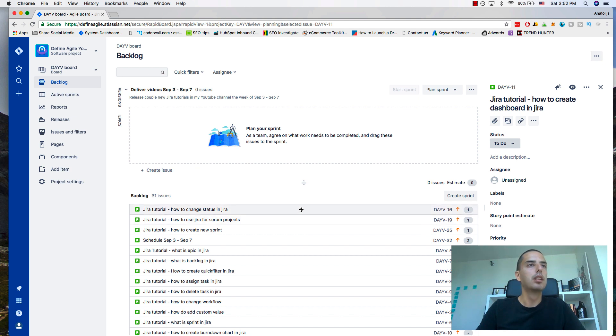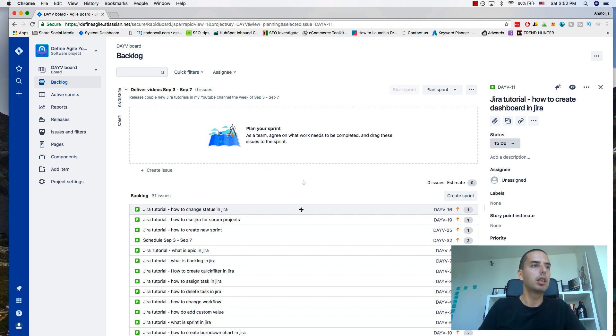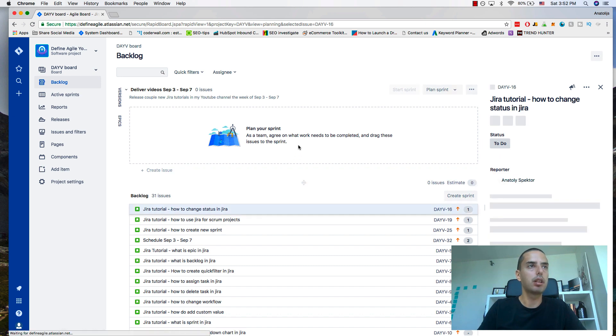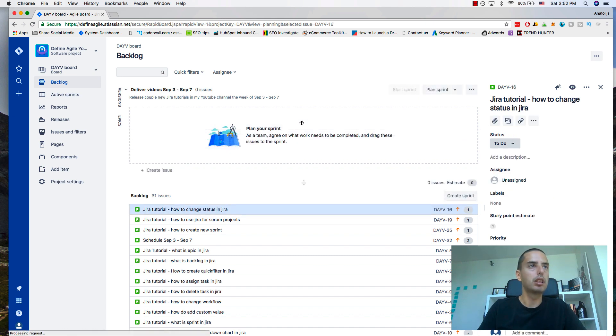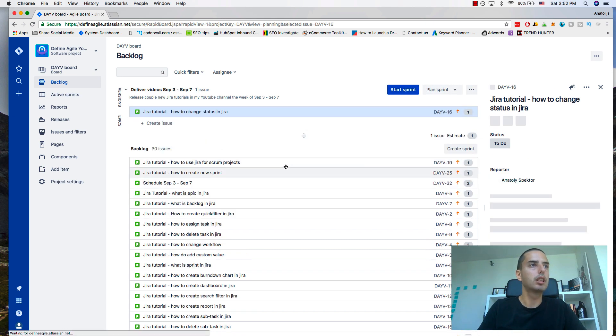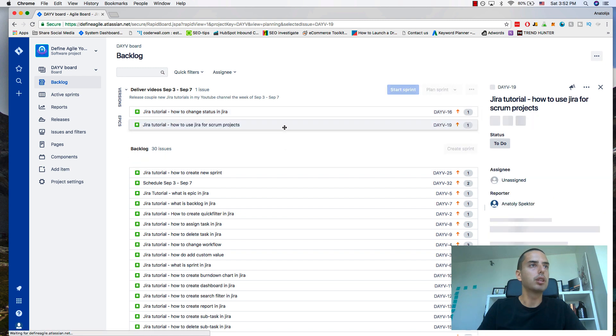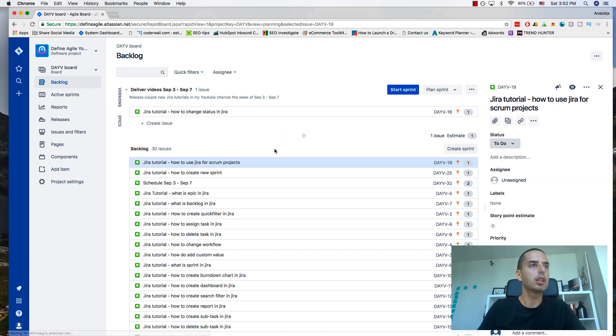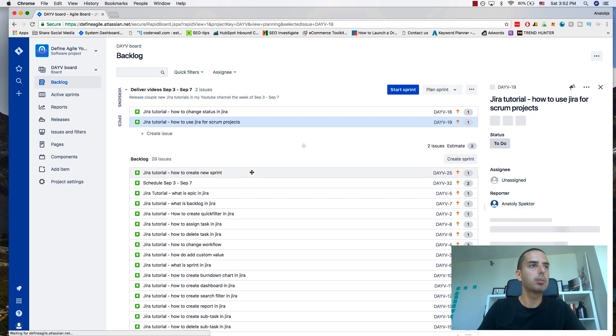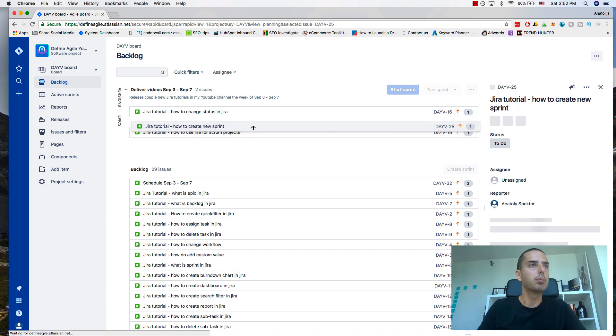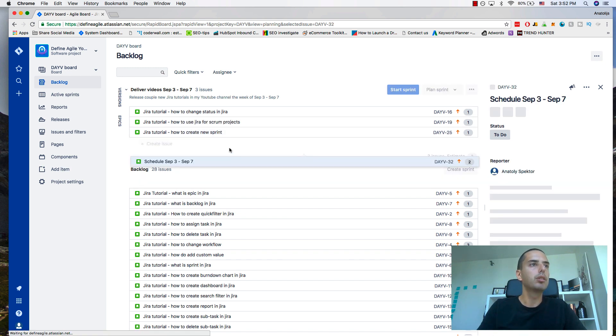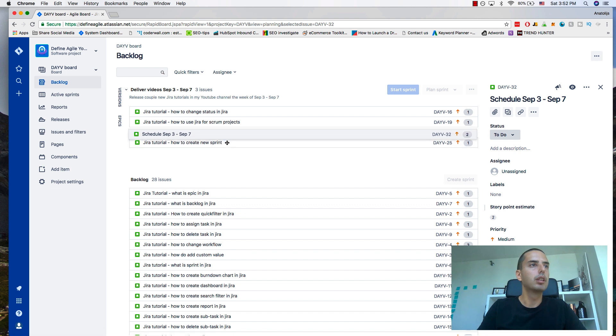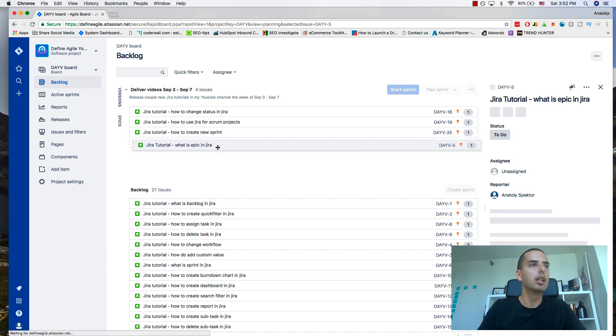My sprint will be one week, so I need to think what can I accomplish in one week. I have a couple stories that I think I can accomplish. I'll create a couple videos: how to change status in Jira, how to use Jira for scrum projects, just drag and drop it to your sprint, how to create new sprint exactly what we're doing now, schedule those videos, what is epic in Jira.